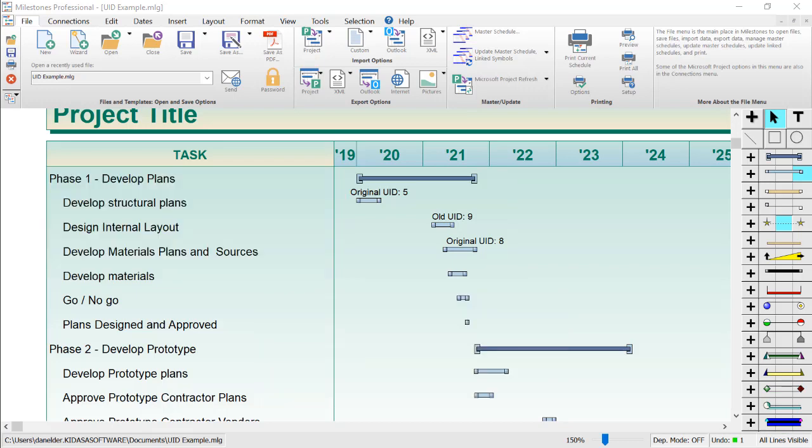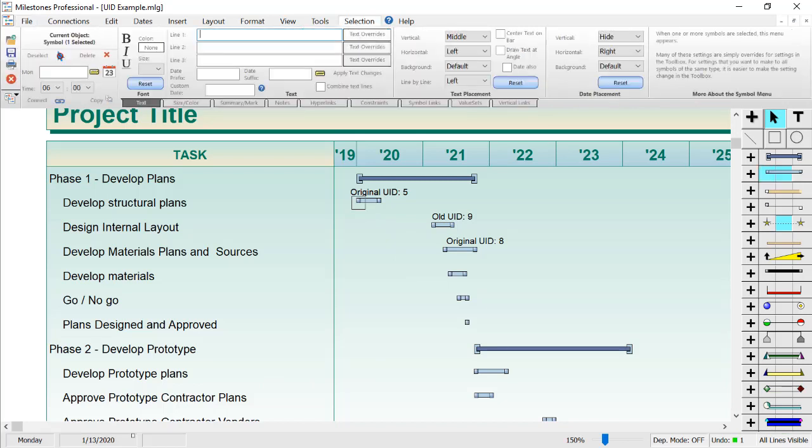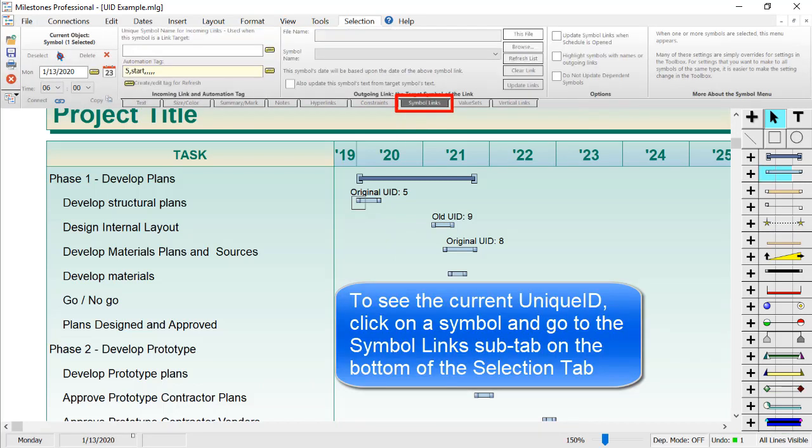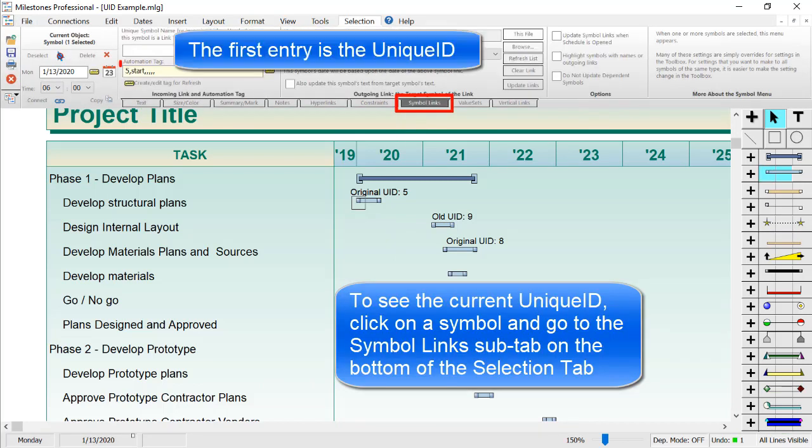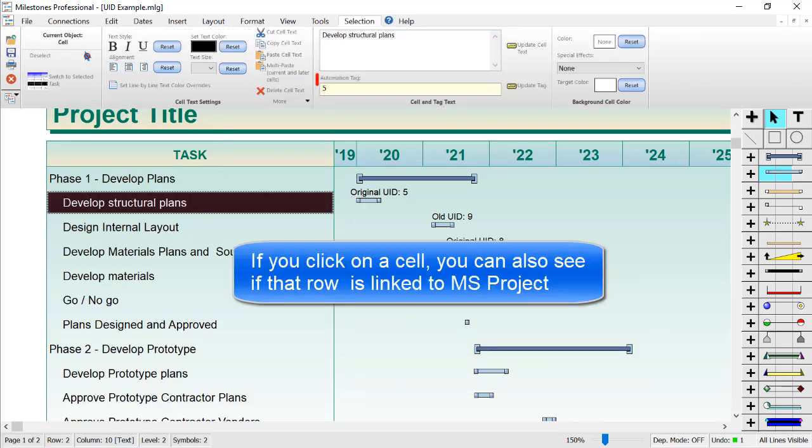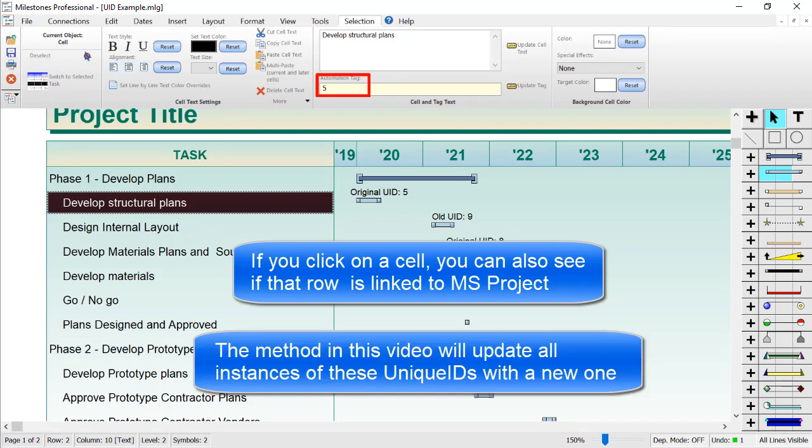If I click on one of the symbols and go to the Symbol Link sub-tab, you can see the Symbol Link contains the original unique ID, in this case 5. Also, if I click on the cell inside the task column, you can see the actual row itself is linked with that unique ID as well. The method in this video will update all instances of these unique IDs with a new unique ID.